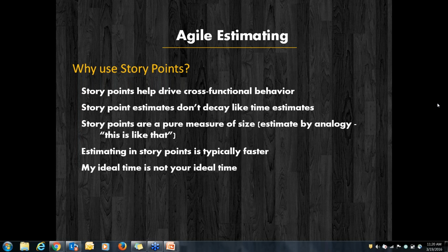Okay, it's not the Scrum Master or the Agile coach. It is the team who plays a role here, because involving everyone in the team is the key. So the team was pretty much part of it, going through each and every requirement and trying to do the relative sizing. Yeah, because when you do that relative estimation, it's the team, because every team member has a different perspective about the product, how to implement it, or the effort which is required. And collectively, you come up with that effort, or the absolute estimation, in hours.